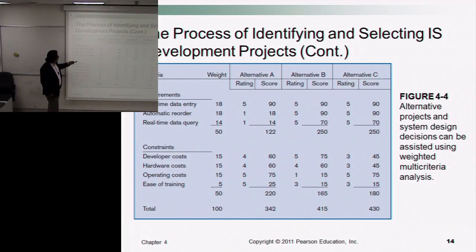Because for those requirements whose rating is 1, that means these are those requirements which are least possibly met, right? But fortunately, the cost to develop these requirements is very low. So I can keep in mind, based on my budget, since these two requirements meet at very low cost, that is why I can still go for option A, right? And they are also least important, and they do have the least possible cost involved.